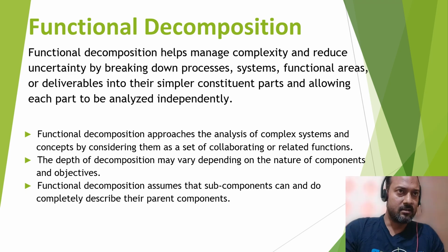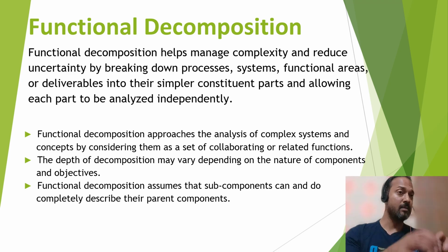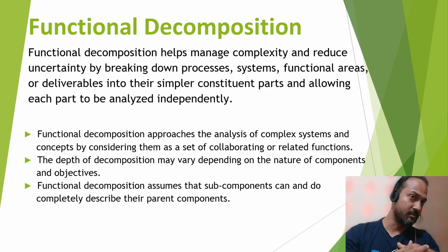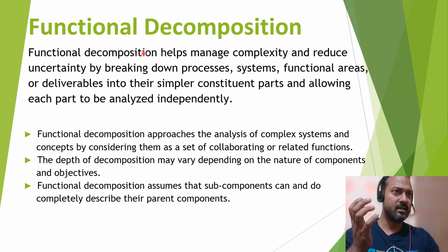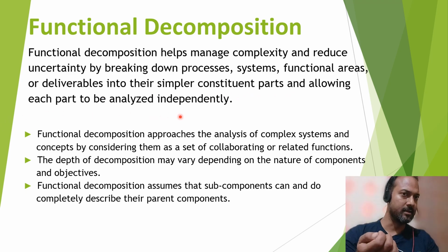So as the keyword says, functional decomposition, here you break down the functions into smaller chunks that would help reduce the complexity, that would help you to calculate or estimate something very easily. So functional decomposition helps manage complexity and reduce uncertainty by breaking down processes, systems, functional areas, or deliverables into their simpler constituent parts and allowing each part to be analyzed independently.